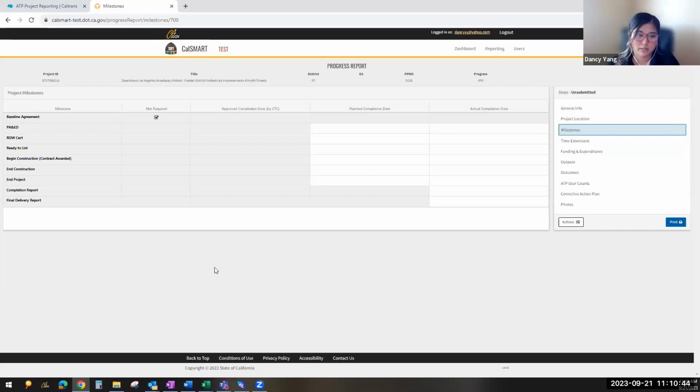So please do be very aware of the date of when you did the before counts so that you can utilize it. For those of you that got adopted, if you allocated your construction in 2019 and before, your before counts and stuff you can use from your application. But again, the interim count guidance was approved and adopted in 2019, and it indicated that anybody that allocated construction after October of 2019 has to follow the interim count guidance of when and how you should be doing your counts.